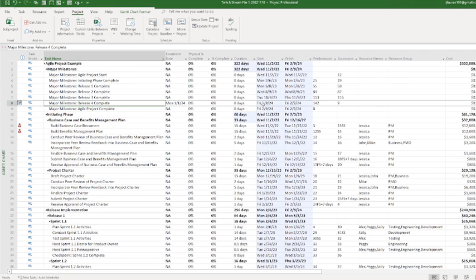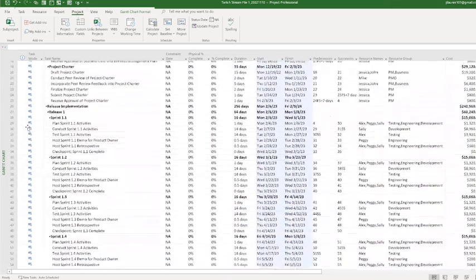there's a major change to the schedule. And you see it's not meeting our date. As you see, the start no earlier than constraint is a soft constraint, so, of course, the adjustment to the schedule pushed it all the way out. And over here in your status indicator, we now have resource over allocation.